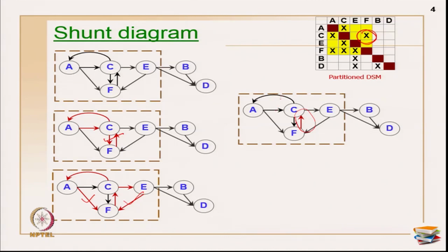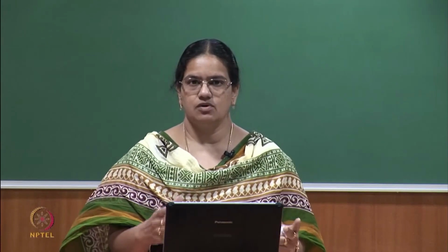If I have to choose one more tear mark in any of the 2, then with 2 tear marks I have actually broken down all my cycles. So, I will have only sequential or parallel activities right now to start with, then repeat wherever you made assumptions to check, and then based on that you will get a duration for the entire process.